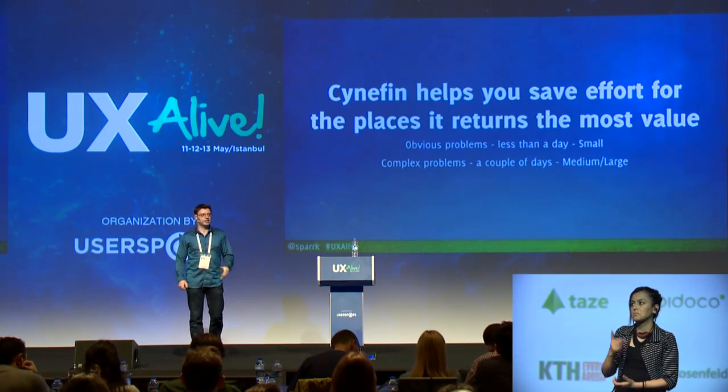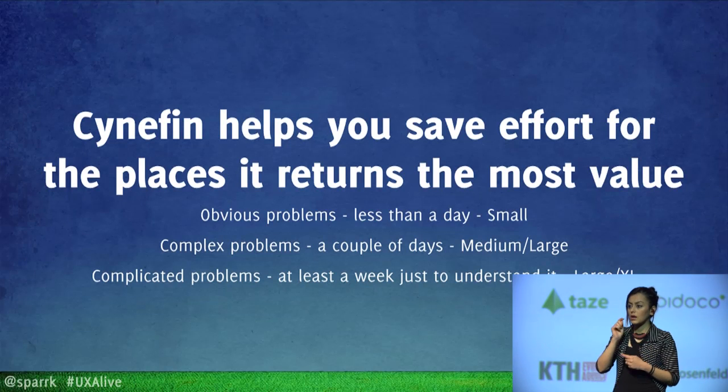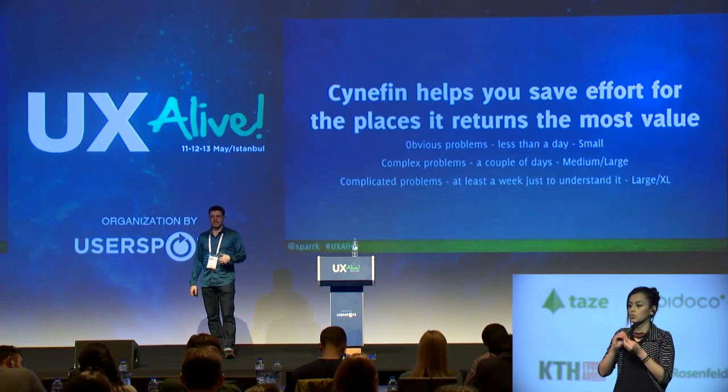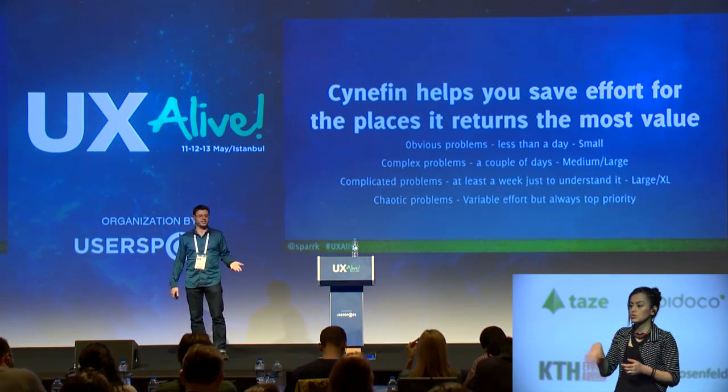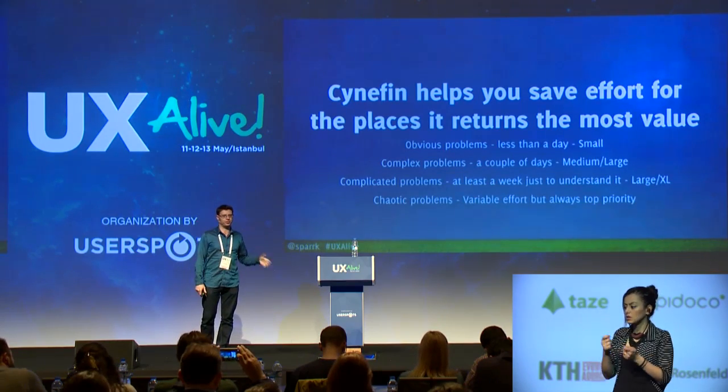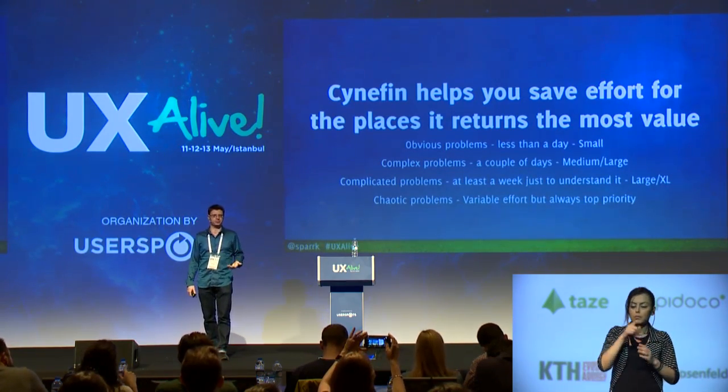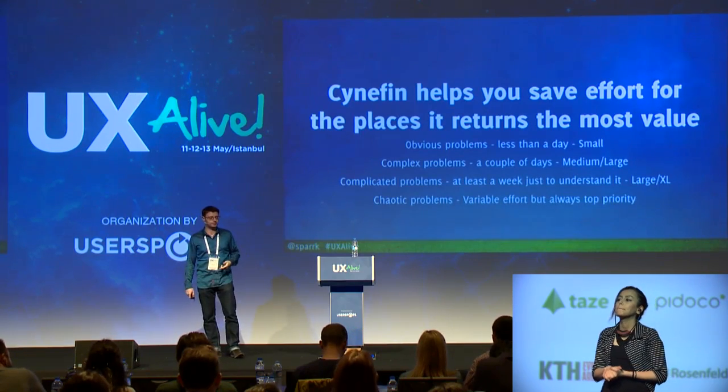Complex problems, again, might take a little bit longer, might take a bit of research, might take a bit of iterating the designs. So maybe it's a medium, possibly a large. With complicated problems, it's going to take us a week, just flat out. We're going to have to do discovery. We may have to do research. We may have to do testing. Various different parts of the business are going to have to come together to start making decisions on this stuff. So it's large or extra large. And then you really can't account for chaotic problems. You just got to know that when they arise, it's going to take you out of the flow, and you're going to have to start working on a solution for it, because they have to be addressed where they stand.